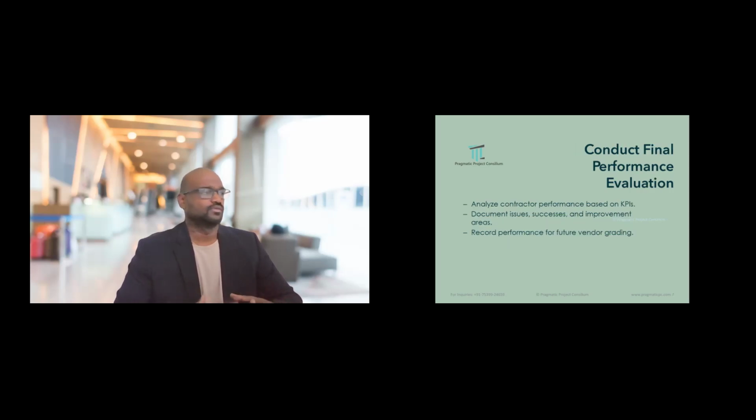Conduct final performance evaluation. So you have to analyze the contractor's performance based on KPIs, what are the documented issues, successes, and improvement areas, what lessons learned you applied from the previous projects, and what successes happened in this project has to be recorded. So you have to record the performance of the contractor for future grading, and this will be shared with the procurement departments to have an update for the next bidding services.